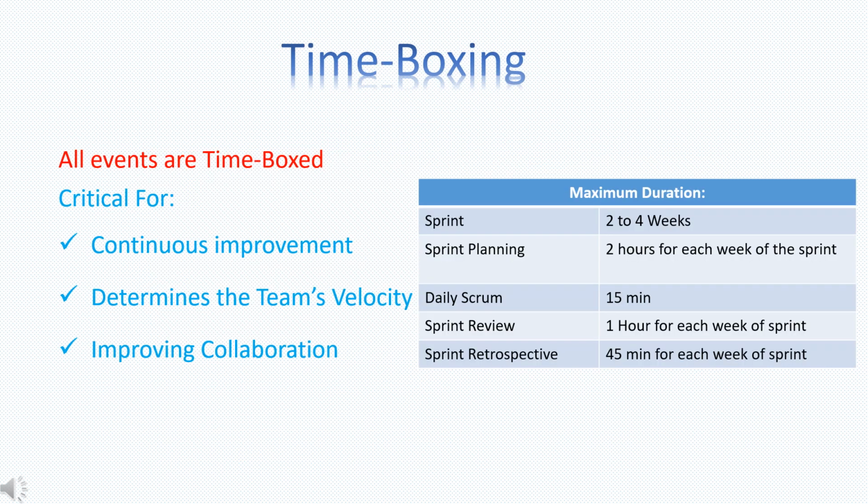In time boxing, if something cannot be completed in the time-boxed period, it is deferred to the next period. In Scrum, time boxing is critical for continuous improvement, determining the team's velocity, and improving collaboration. Time boxing is applied to all events in Scrum.